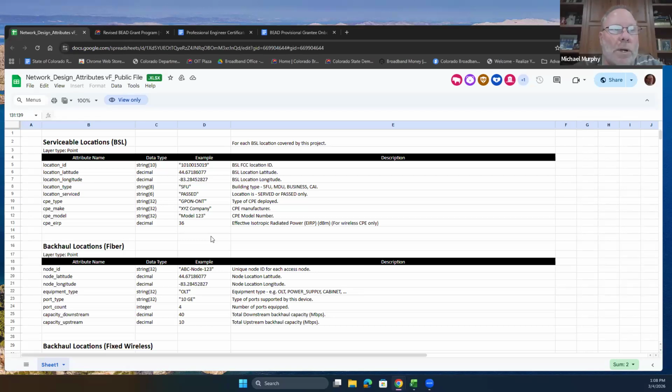Yes, Adam, what we're expecting is this first review is more of a review of capabilities, throughput, and bandwidth capabilities, that what was in the application, what's being proposed, can truly be delivered. We realize that even after NEPA review, there may be changes to this, that you've got to route a different way to route around a wetlands or an endangered species area. Then you would update it at that point, or you would update your as-built at the very end of the project.